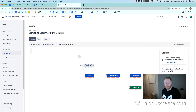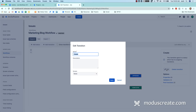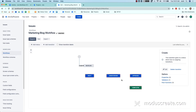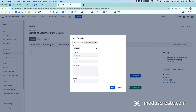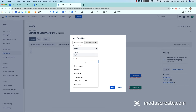Transitions, simply put, are just the connection points — the paths between statuses that issues can navigate through the workflow. Unlike statuses, transition configurations are specific to the workflow and won't impact others. If I select the create transition and click edit, like the status it has a simple name and description, but different here is that you can associate a screen with a transition. Simply put, a screen is a collection of fields or data points that you can collect during the transition. For now we'll leave this alone and go back to the workflow to fill out some more transitions. To add a new transition, you can select the add transition button, and then fill out a few data points — for example, moving from the initial status backlog to draft. The name should describe what you're doing and should be an activity, since it also resembles the button users will select when trying to create this transition in the issue view.